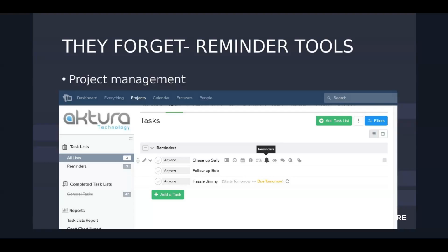Yeah, in effect, it's more things to stop them giving you the content, isn't it? More impediments. Yep, absolutely. But how you can use project management is to remind yourself. If you have a task to follow up or get content from someone, this screenshot here is Teamwork, and you can set multiple reminders. You do have to do it manually on each task, but you could create a reminder per week for the next 4 weeks, just to make sure you check in. I think time blocking is a better option, but I like to present this as an option.